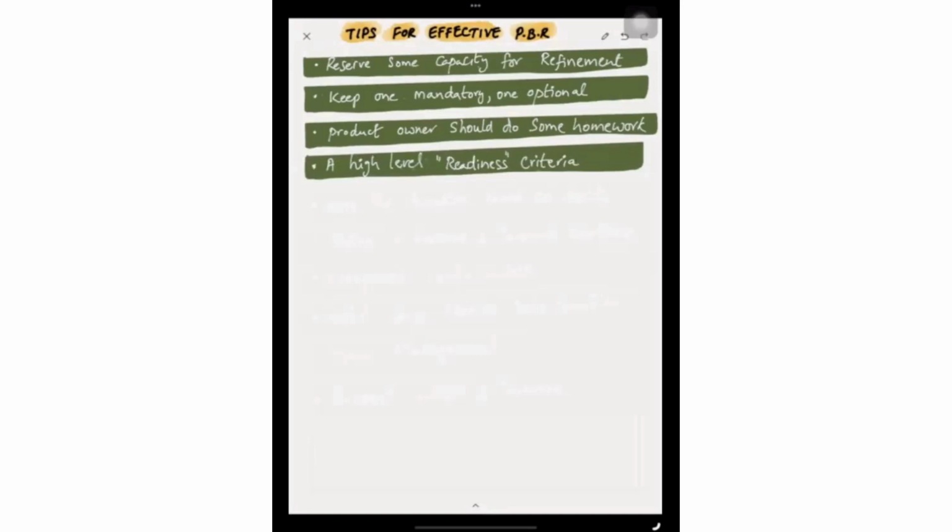So definition of ready is not part of the Scrum framework, but teams effectively create it as a counterpart to definition of done, which is not stringent enough. For example, something like at least major acceptance criteria should be clearly defined. A rough UI mockup is available. High level dependencies are identified. Something like that. If you have that, that's a good criteria.